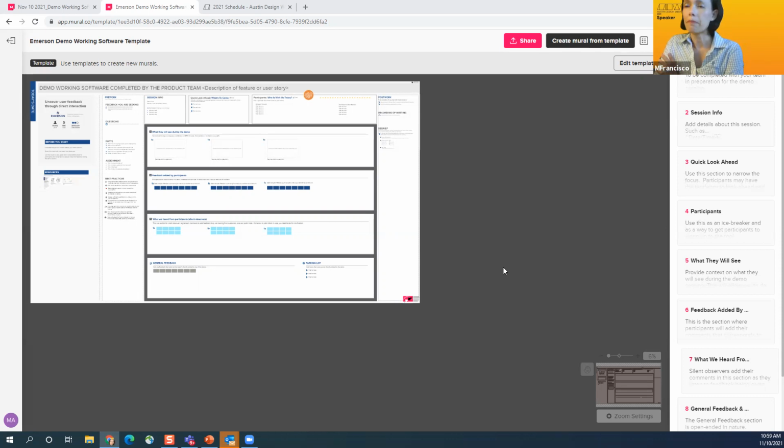For how often? Funny you ask, because the 4 of us are actually part of the customer engagement initiative team, and we actually created a customer engagement guideline to use within our product development. And the rule of thumb that we try to live by is doing customer engagement at least once every program increment. And to us, that's once every 10 weeks.